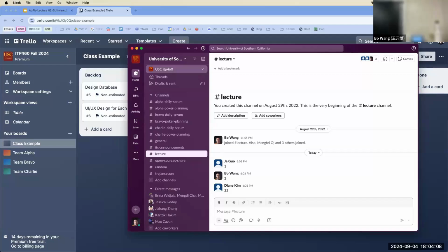Then we have different opinions on this, so we allow someone to express why. John, why do you think it's a one, not a three? Because it's just writing one paragraph. He thinks it's just writing one paragraph. And why do you think it's three? I just think it needs a lot of consideration, because your whole project is going to depend on it, and it's more than just how much you write, but how much thought you have to put into it. That's great. Do you agree with what she said?